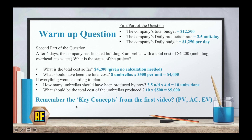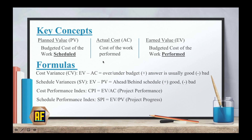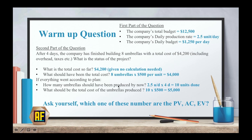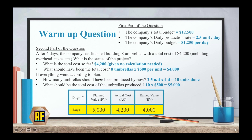This is what should have occurred. Remember the key concepts from the first video: PV, AC, and EV. Here is the slide from the first video giving you each concept and the formulas. Which of these numbers are the PV, AC, and EV? As you can see in this table, we have days, PV, AC, and EV. At day number 4, our PV — the total planned cost of umbrellas — is $5,000. Our AC, the total cost we actually paid, is $4,200. And our Earned Value is $4,000, which is what should have been the total cost of the work completed.